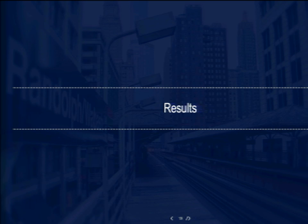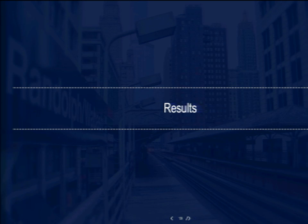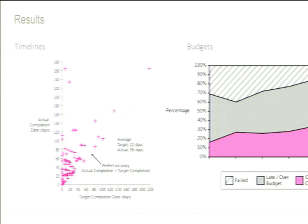Looking at the metrics around these problems: the chart on the left shows project timelines from several organizations — everything is above the line of 'delivered on time,' with almost none delivered ahead of schedule. On the right: 20% of projects are on time and on budget, 50% are either over time or over budget, and 30% fail.